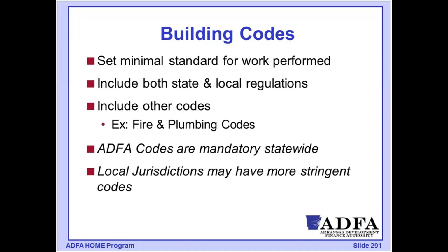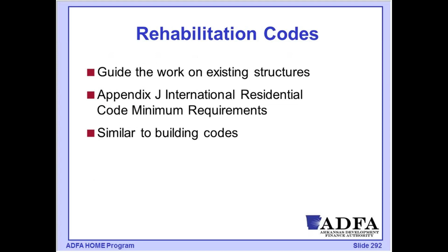ADFA, in trying to create appropriate minimum standards, has put the ADFA codes in place to be mandatory statewide. Now keep in mind, in the local community that you're working in, you may have some local codes, and in some cases they may be more stringent than the ADFA code. You, of course, will have to comply with the more stringent code. The ADFA code set sort of a minimal standard, but in some cases you will have a higher standard that you will have to document.